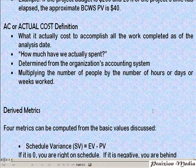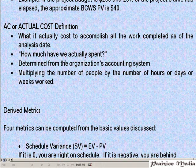But Earned Value asks a different question: how much work have we actually accomplished? Remember there was a storm, so I didn't complete the work in one hour — I completed it in two. I should have been further ahead than I was. So at the end of the day, you've got Earned Value, Planned Value, and Actual Cost. Actual Cost can be derived in several ways — multiplying the number of people by the number of hours, days, or weeks worked. In this case, it's multiplying the number of hours times the cost: two hours times $10, which gives you $20.